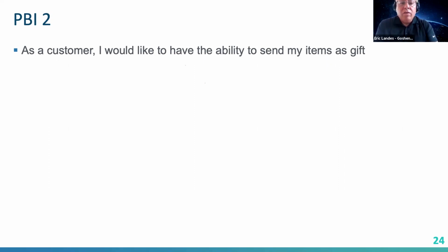Yeah, and that's kind of where I was going in this. So, hopefully, no matter whether we're doing this remotely or we're doing a refinement session in person or some kind of combination, I don't care so much about the numbers. What I care about is that we're talking about things like what you just mentioned, Mike: hey, this should be split into two stories. I mean, to me, that would make total sense, right? Or maybe even more. Because if I was a team member having to code that, I would certainly give it a high number, because I think it's very large.